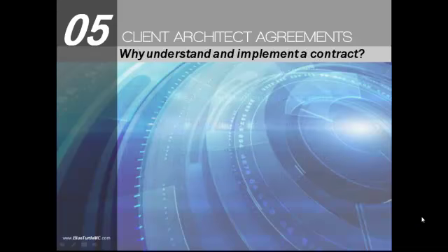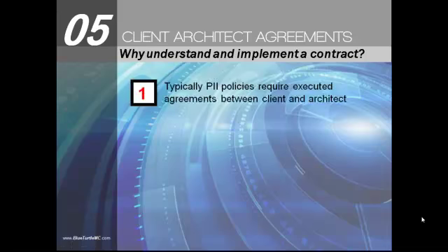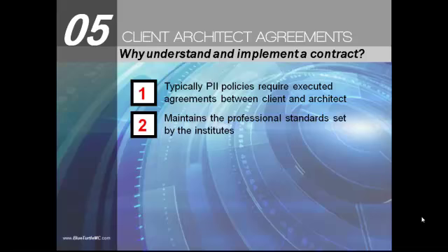So let's start by looking at my top 5 reasons why you, as an architect, should implement and understand your agreement with your client. Firstly, typically all professional indemnity insurance policies require that the architect enters into a signed agreement with the client. If you don't do this, you may not be covered under your insurance policy.